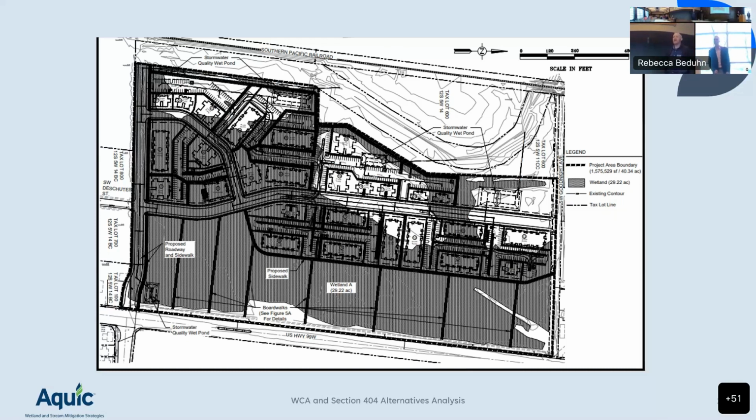You tee up one of my favorites, a preliminary plat. A final plat's final, a preliminary plat is preliminary. If for whatever reason wetlands are not brought in right away at the beginning, and it gets through preliminary plat, maybe I'm speaking more to LGUs, but you can go back and reconfigure that plat to take into account wetlands, if it's preliminary. I've seen where an LGU, consultant, whoever says, no, this can't be changed because it's already a preliminary plat. Go back to the planning commission, bring the wetlands back into the equation, redo your plat accordingly.